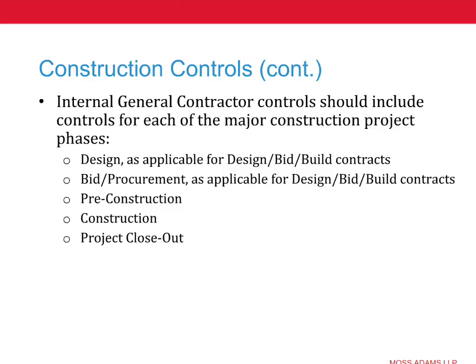Certain key actions need to take place as you progress through a construction project, and your controls and your procedures should be defined in such a way that each of the core components of that phase of the project is addressed before you move on to the next one.